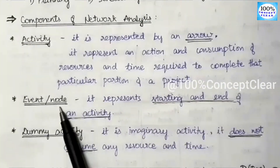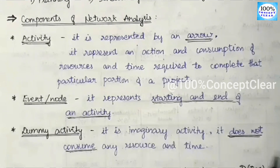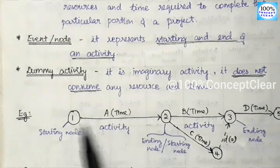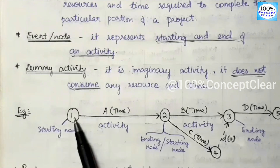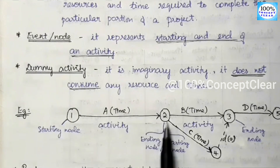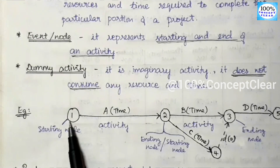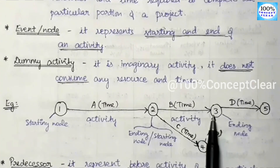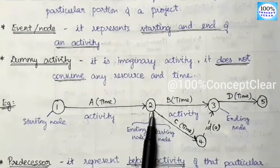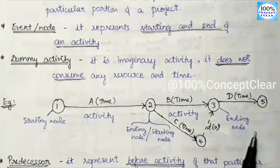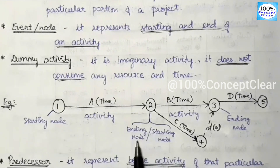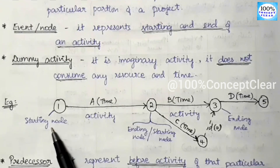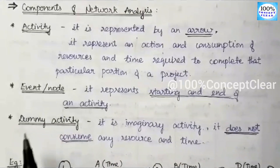The next component is event or node. It represents the starting and end of an activity. Every activity has two nodes: a starting node and an ending node. For activity A, the starting node is 1 and ending node is 2. For activity B, starting node is 2 and ending node is 3. For activity C, starting node is 2 and ending node is 4. The starting node is also known as the tail, and the ending node is also known as the head.